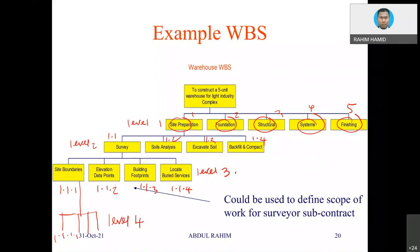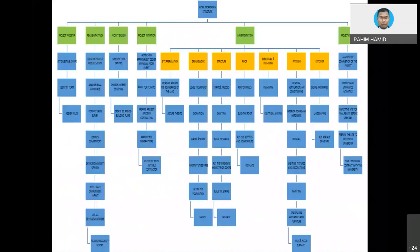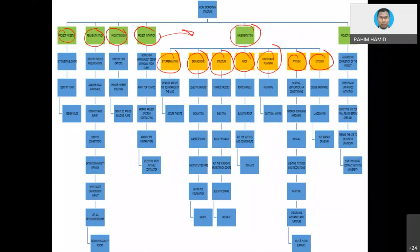It is up to the planner to decide how far to go into detail. Here is another example of WBS starting with project setup, feasibility study, project design, and project initiation, leading to implementation — which is the real construction phase consisting of site preparation, groundwork, structure, roof work, electrical and plumbing, finishing interior and exterior, etc. — and lastly project ending and handover.